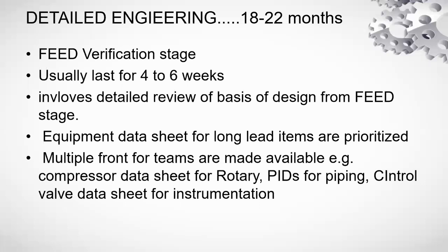They are found, they are raised, and they are discussed with the client, and this FEED verification stage is usually expected to finish in 4 to 6 weeks, with the outcome being a FEED verification report. As the project moves towards the end of the FEED verification stage, multiple fronts for teams are made available.